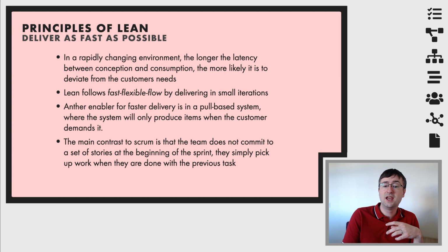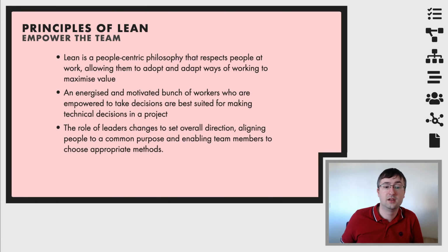What we do instead is we look at our overall product backlog and we pick the ones that are interesting based on what our customer on site is saying or what the development team are thinking is important at that point in time. And the development team would have an idea about what's important because we're trying to empower them. We're trying to empower the team and empower the people inside it. Again, people over processes.